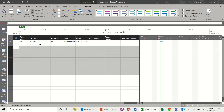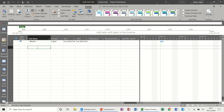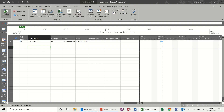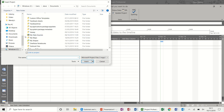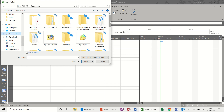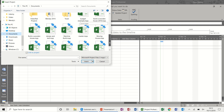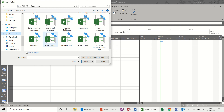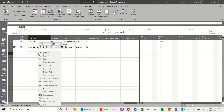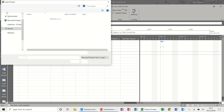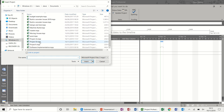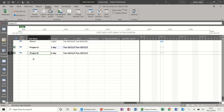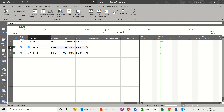To create a sub-project, go to the Project tab and click on Sub Project, then find the project you want. This is in Documents — Project A and Project B. Select Project A, then follow the same process for Project B to bring them both in.